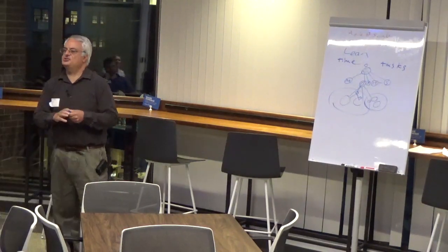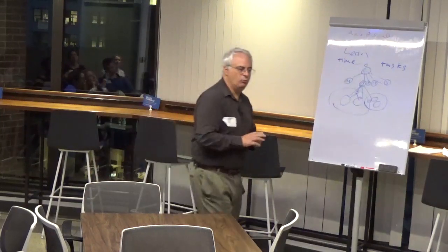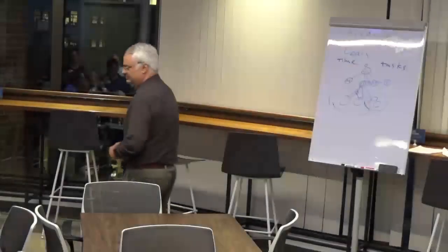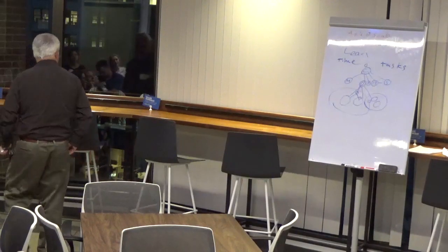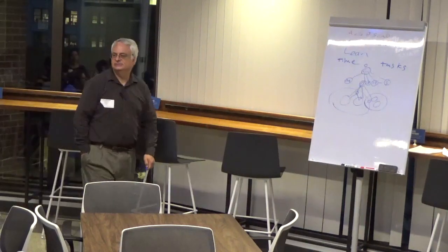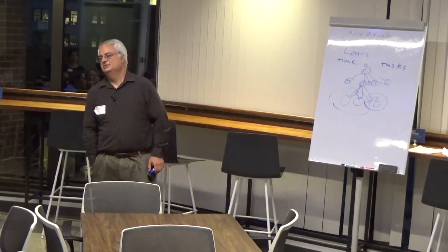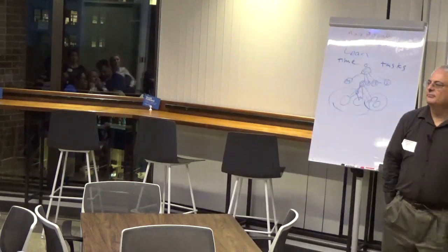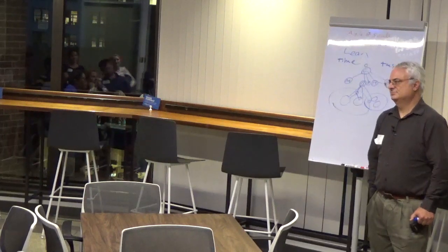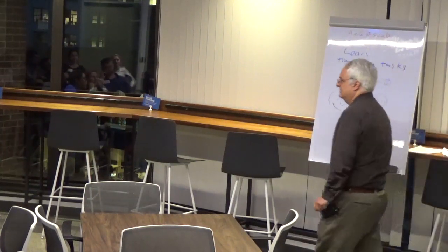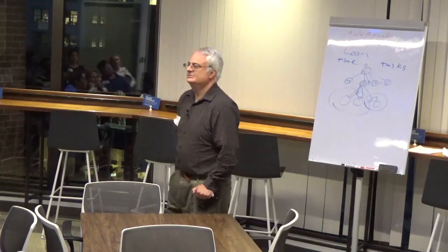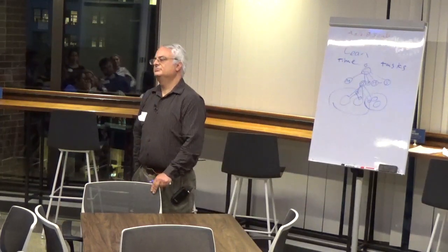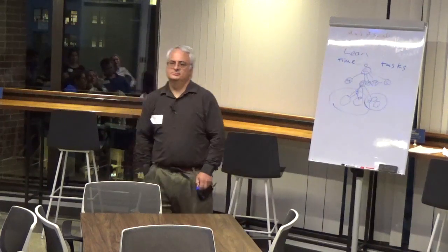So a lot of people shaking their heads. So how do you scale so they understand it better? Or does it make sense? What should they know? Anyone have any thoughts on that? Well, if you're looking for a roadmap and anything time-based, then there has to be some consistency within the teams, even if they want to be agile and develop their own practices. If they're each different, then they come up with different velocities or a different way to project, and then they vary, and then management won't like that. So there has to be some consistency within the teams if you're trying to roll that up in any sort of way and to be consistent.